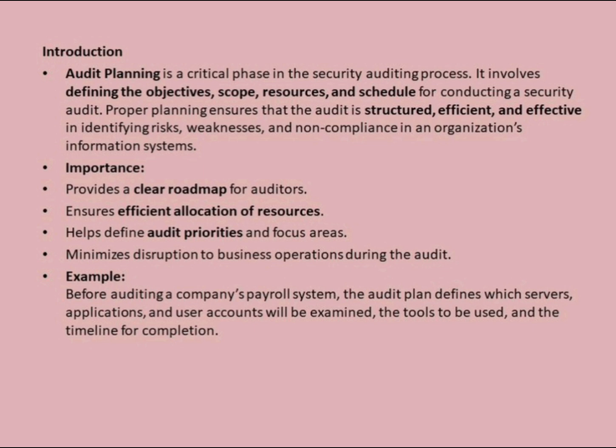Helps define audit priorities and focus areas. Planning allows auditors to prioritize high-risk systems, such as servers storing sensitive customer data, ensuring that the most critical areas are evaluated first. Example: a retail company prioritizes auditing its online payment gateway before auditing internal file servers.